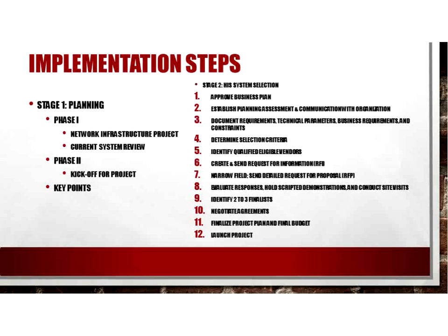The proposal from the vendor in response to your request for proposal represents a greater commitment than the more cursory response that you had with your request for information, or your RFI. So then we're going to take that request for proposal and dig into those details. We're going to make sure those vendors are held to their representation in their response to their request for proposal. The RFP responses are attached to the agreement with the vendor as part of the contractual obligation. And then both parties will sign on the dotted line,